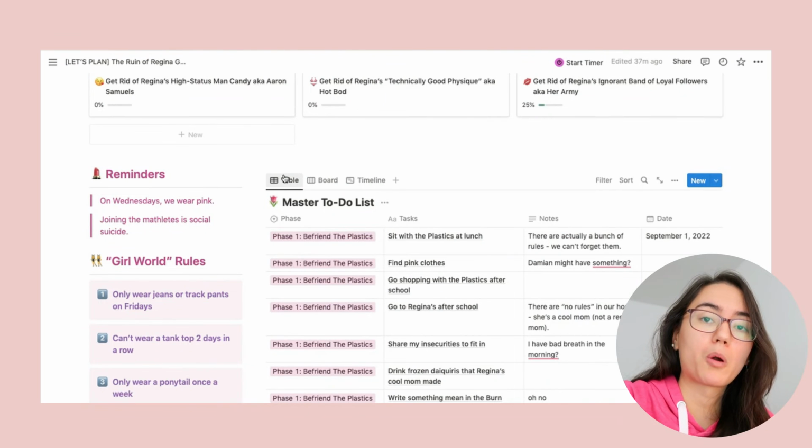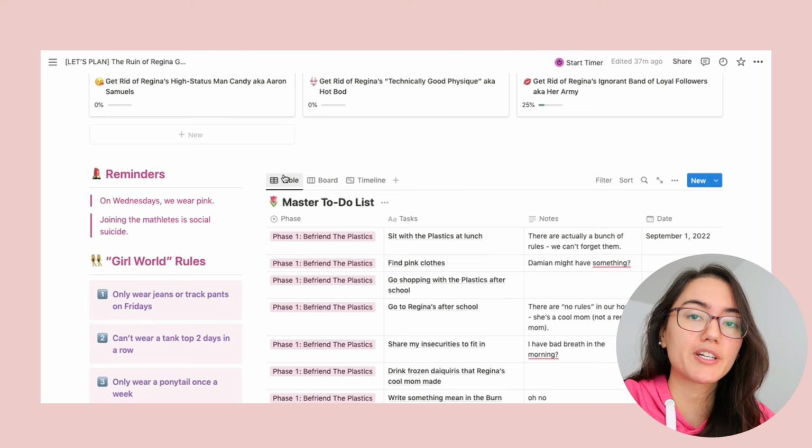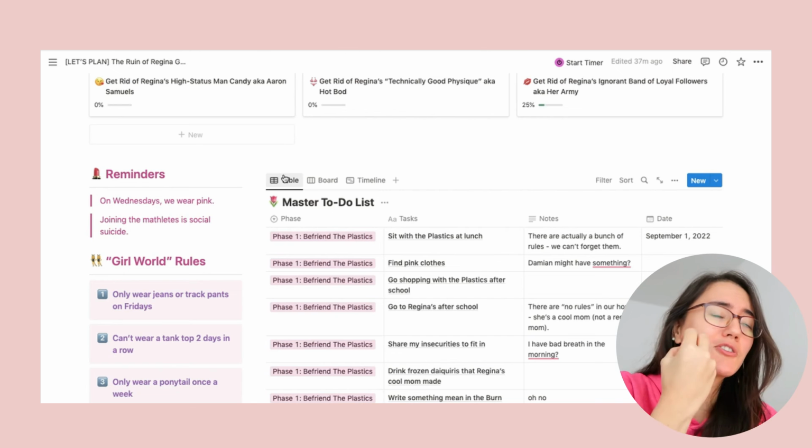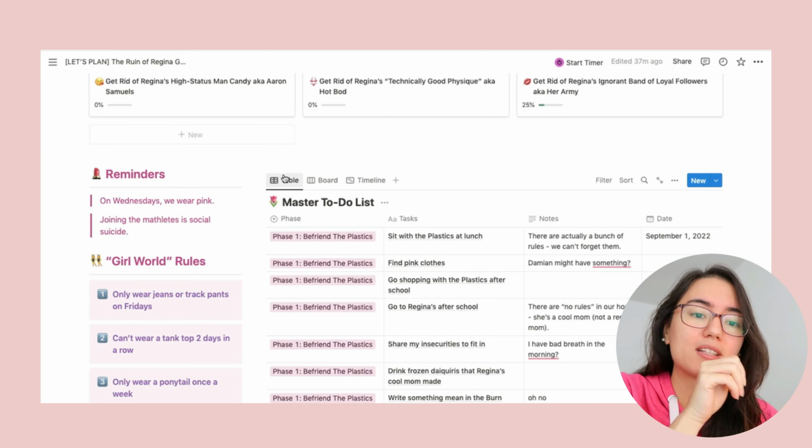This one's really important for regular projects because if a task doesn't have an owner, it won't get done. My rule is that each task needs one owner, not somebody will probably end up doing it, and also not you 4 are in charge of this one singular task. It needs one owner for each task.